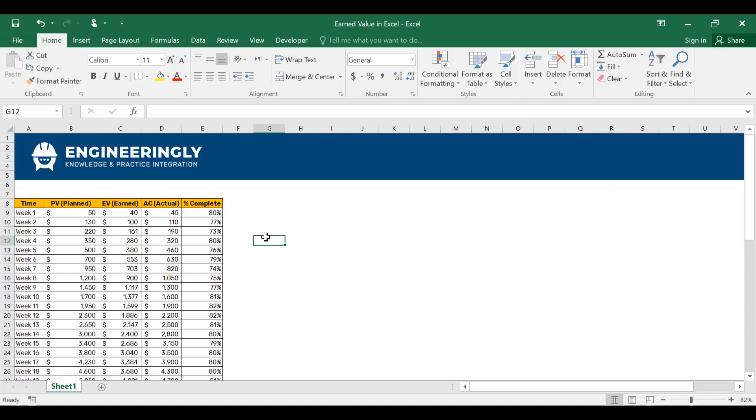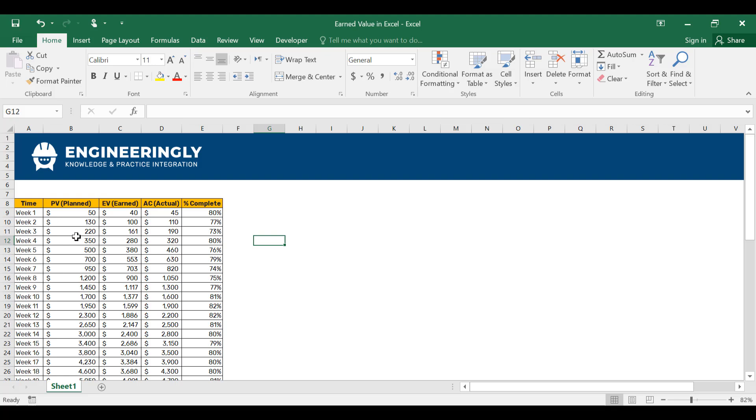The most essential and crucial thing to create your earned value charts in Microsoft Excel is to put your data in the right order. As you can see here, we have the planned value, which is basically the cumulative planned value. So for week 1, the planned value is 50, and for week 2 individually, the planned value will be 80. But since it's added to the value of week 1, the cumulative value for week 2 will be 130. For week 3 individually, this value will be the difference of these two, which will be 90. But since we are looking at cumulative values here, this will be 220.